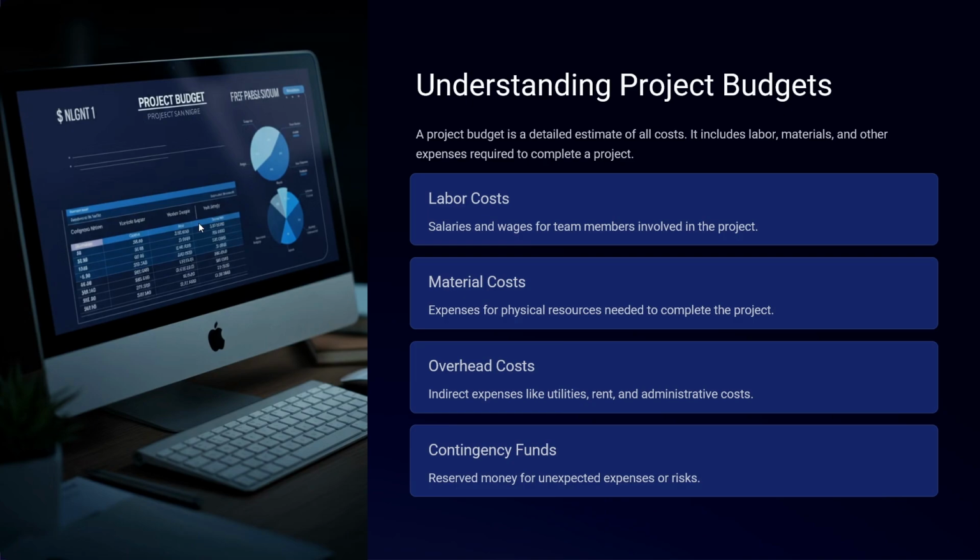Let's break down project costs even further. We are talking about labor. This is wages and salary for team members involved in the project. In some companies, we can allocate the salary directly to the project. If not, we need to use the allocation process, where we use the hourly rate for each employee, which is the calculation of his or her costs, including salary and travel. Then we come up with the hourly rate. Then we check how many hours he worked during this period, and we allocate that to the project.